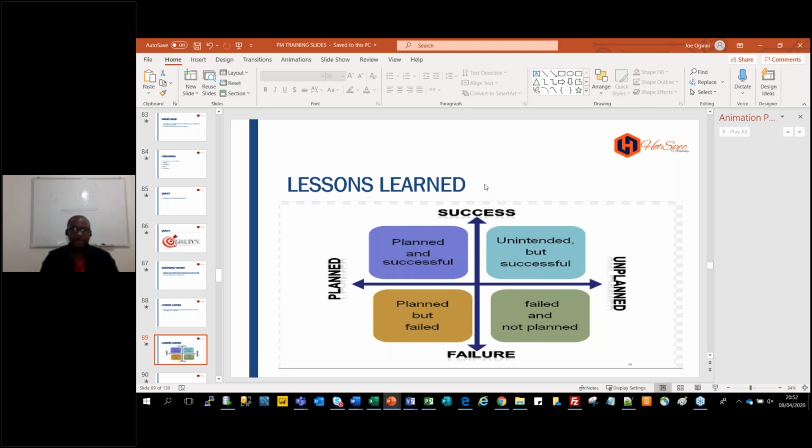Now, some things along the line you didn't plan, they just came up. There are actions you have to take based on your instinct at the time. Those actions are unplanned tasks. You didn't note them down, but you just respond to them as they happen. Some of them you decided suddenly, let's do it this way, let's try this, and it worked well. Take note of it: unplanned that worked well, unplanned that didn't go well. So the things you planned that went well and the unplanned that went well, merge them together.